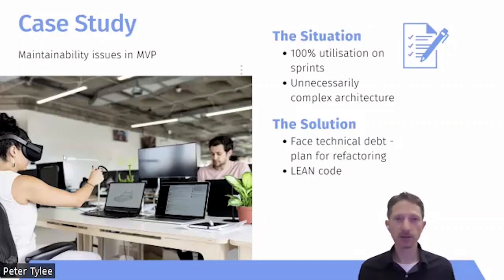On this project, I'd say it was about a factor of 4. So we were taking 400% of the amount of time that I expect would have been reasonable on a lean code base. 400%. Something to consider when you think about it in terms of just the economics of it. So that's the case study.